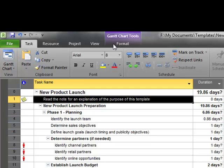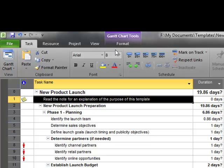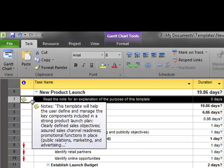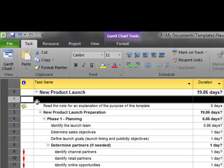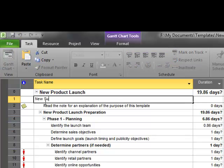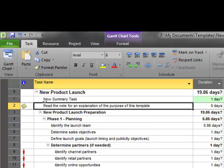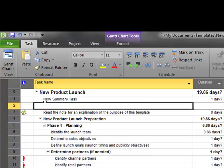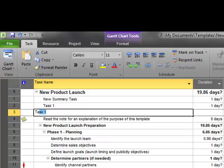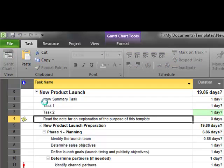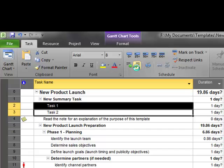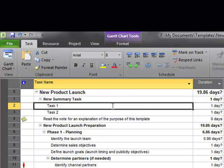So, in the past, if you've used Microsoft Project, you'd be seeing the file menu, the tools menu, things like that. Notice there's no tools tab up at the top. So, essentially, the way this is designed is to help you in organizing and running your project based on a set of common scenarios. For example, if I were in Microsoft Project in the past and I wanted to put a new summary task with some sub-tasks here, I'd press the insert key or right-click and choose insert. And I'd say, new summary task. And then I might insert another task. And I would say, here is the task, another task. And then I'd go ahead and select these and I would indent them. That's the normal steps that I'd normally be taking.